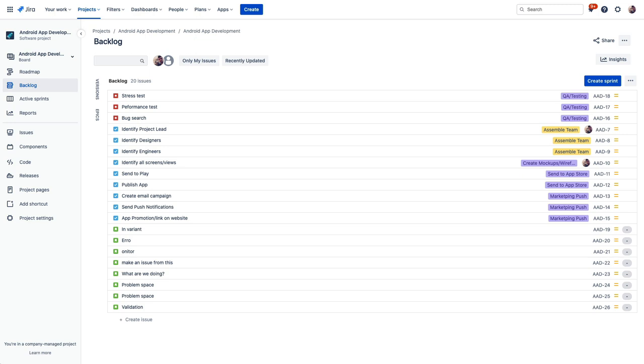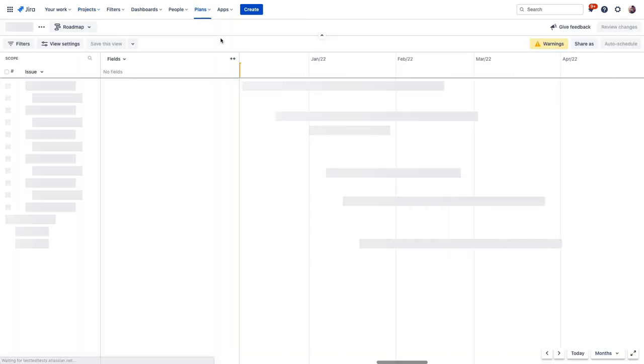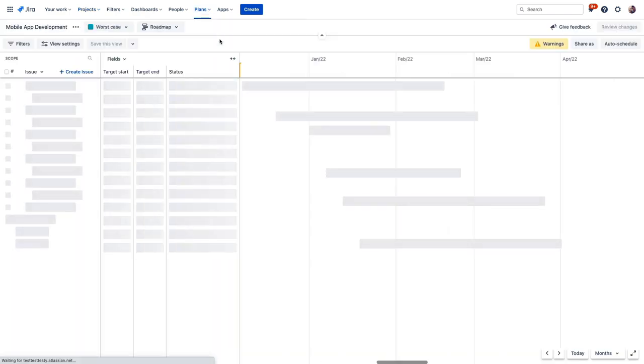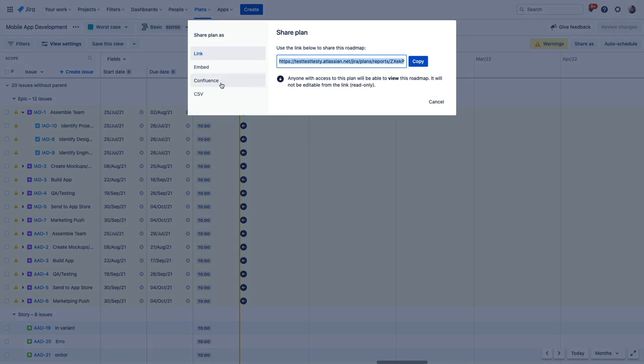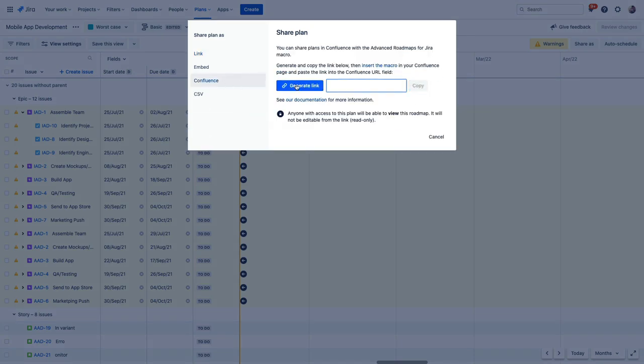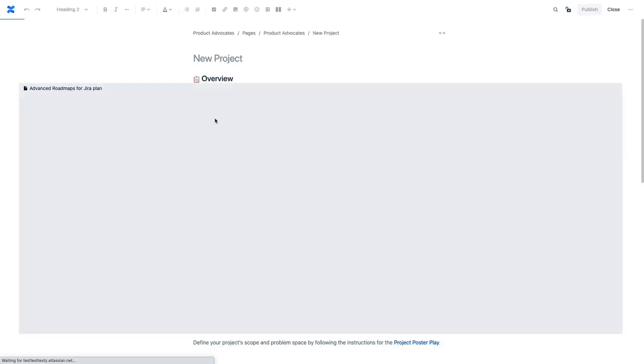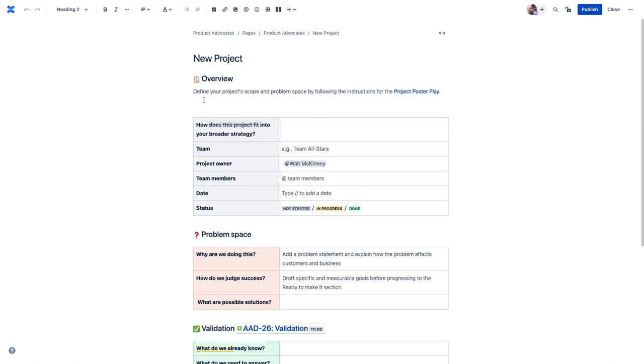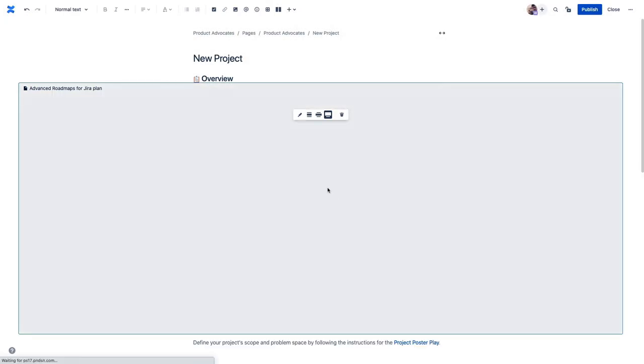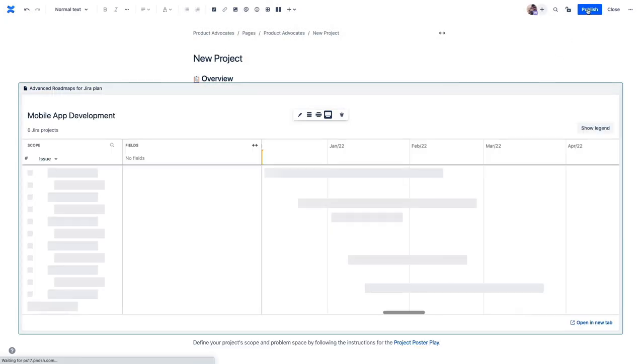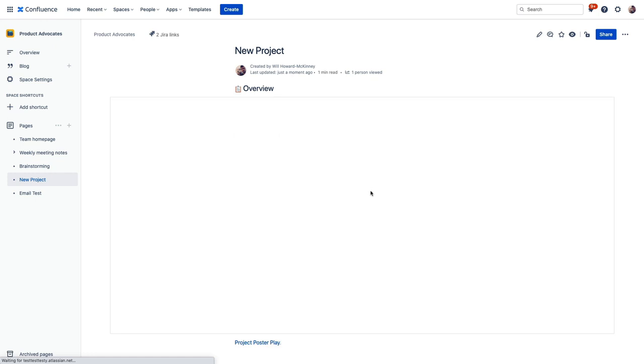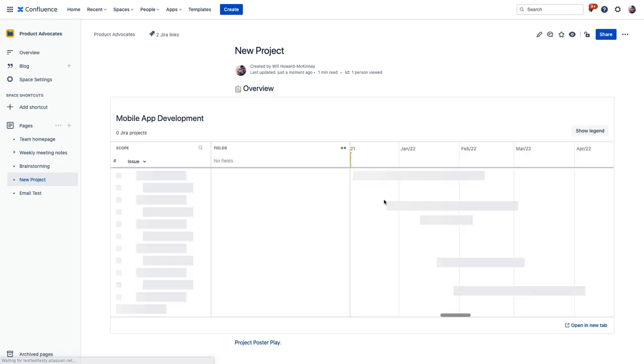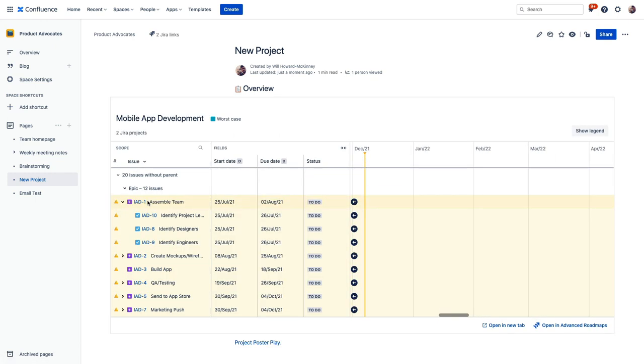Another powerful integration example between Jira software and Confluence is the Advanced Roadmaps macro. In Confluence, the Advanced Roadmaps macro can be used to embed a dynamically updated roadmap in a Confluence page. Now Advanced Roadmaps is a powerful feature for Jira Software Premium that enables you to create organization-wide plans across multiple Jira projects. And having access to that information right here in Confluence helps keep the information you need front and center. And it's also interactive. You can scroll through the timeline, you can jump directly into the roadmap from Confluence, or go directly into an issue from Confluence as well if you need to make any updates.